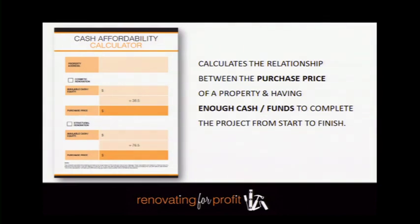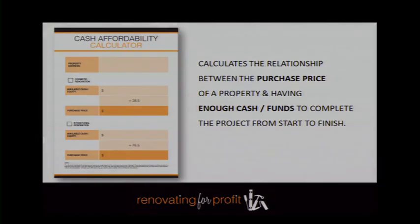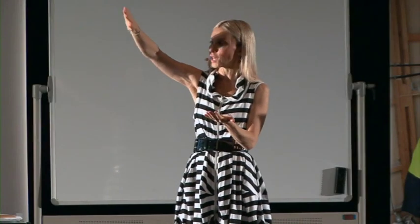Remember yesterday when we covered the basics of renovating — normally when you renovate a property, you get in, you strip it out, you devalue it, and then as you start to put it all back together again, the property value increases. You never want to be three-quarters of the way through the project where you've run out of cash and come to a stalemate. So this calculator makes sure you've got enough money to see the project from start to finish.